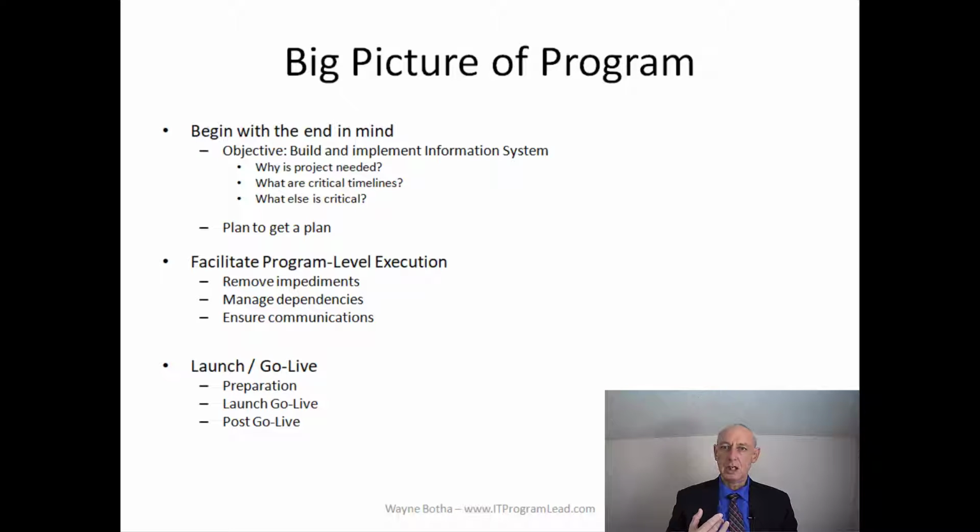Why is the project needed? I worked on projects where an old version of Oracle was going out of date, and with it going out of support we needed to upgrade over 900 databases so that the new version could come into support again and the business could get support for their databases. So that helped a lot to define the exact objective of that program. We knew why the project was needed, what the critical milestones were, and anything else that was critical. For example, if the system must be implemented without disruption to the customers, it's critical that you know that and consider it in your program.